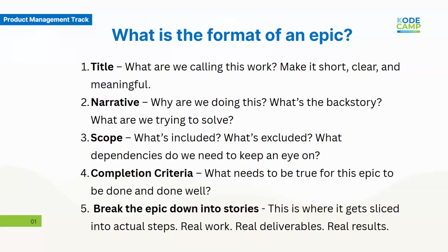So your job here as a PM is to be very clear on what this epic covers. If there's something that's related or not part of this scope, please, at the very beginning, mention it, right? Let your team know where this epic stops so they can focus and they do not cross. Now, this is important because this is where what we call the scope creep happens. Scope creep, right?